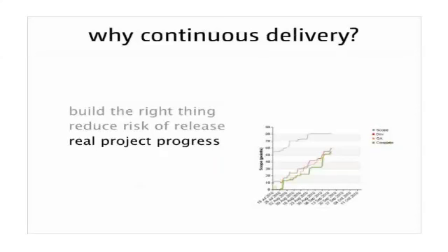So what we want to do to change that is change our definition of done. Dev complete is not the same thing as done. Dev complete means it works on a developer workstation, but when the developer says, I'm done, it works on my machine, do you believe the developer? Hopefully not. The only real definition of done is having your features live in production, delivering value.